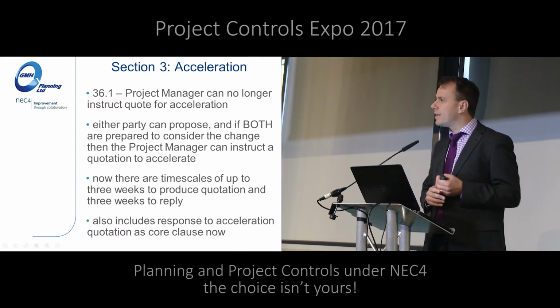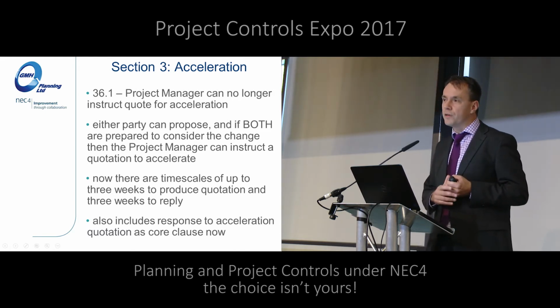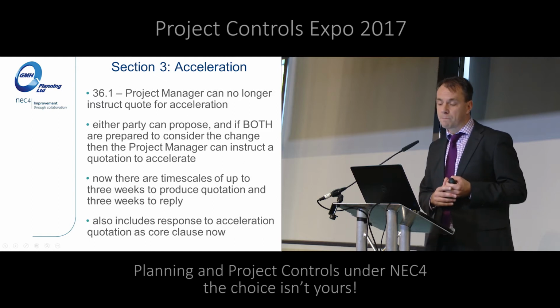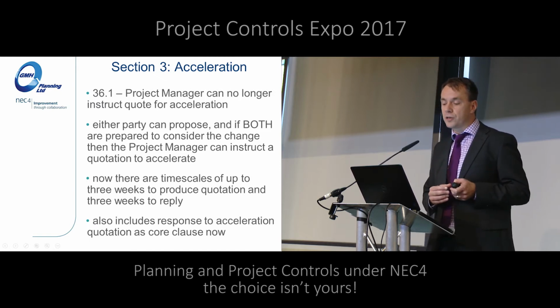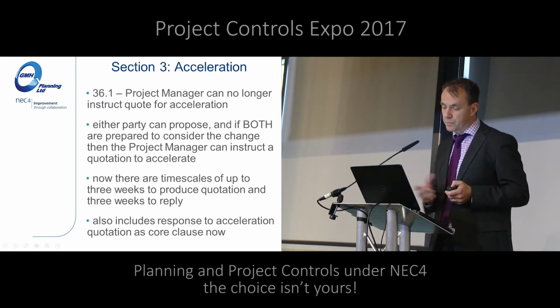I'm guessing if you're accelerating, that's not very quick when you're trying to look for acceleration, and time will be moving on. So obviously, they're maximum timescales. You don't have to take that long. Also includes response to acceleration quotation as a core clause. That used to be lost in the option clauses.